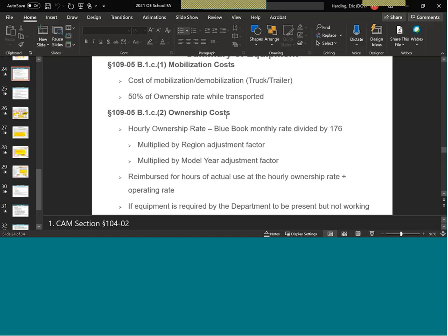If work is less than 10 days, they don't need sub-approval. That is incorrect. You need to read section 100 of your spec book and read the definitions of professional service, work service, and subcontractor. Being on site less than 10 days does not automatically mean you're a service anymore. Used to be back in the day, but now we have very clear definitions of professional service, work service, and subcontractor.